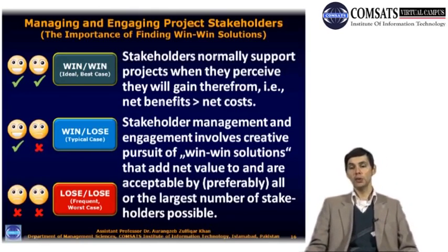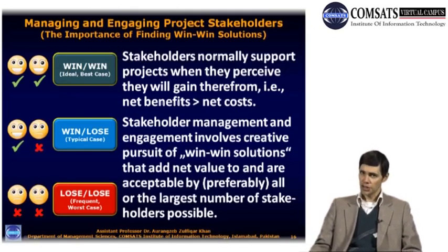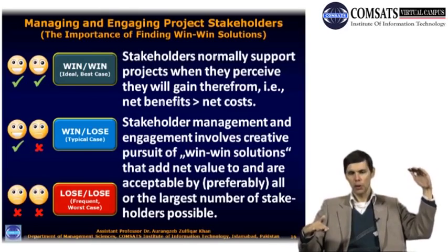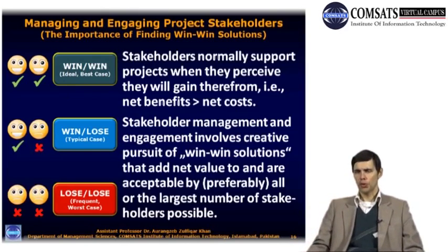Keep in mind that stakeholders normally support projects when they perceive that they will gain from those projects. That is, when they think that the net benefits which they will get are larger than the net costs which they will incur from the project. So there is this disparity. Benefits are high, costs are lower. Stakeholders will tend to support the project.